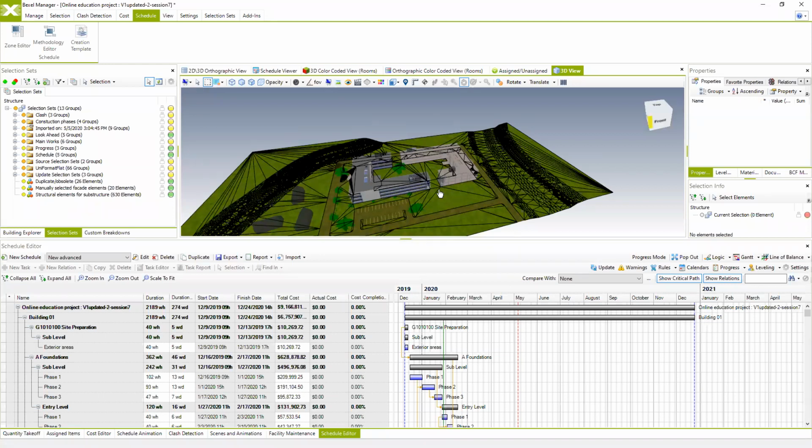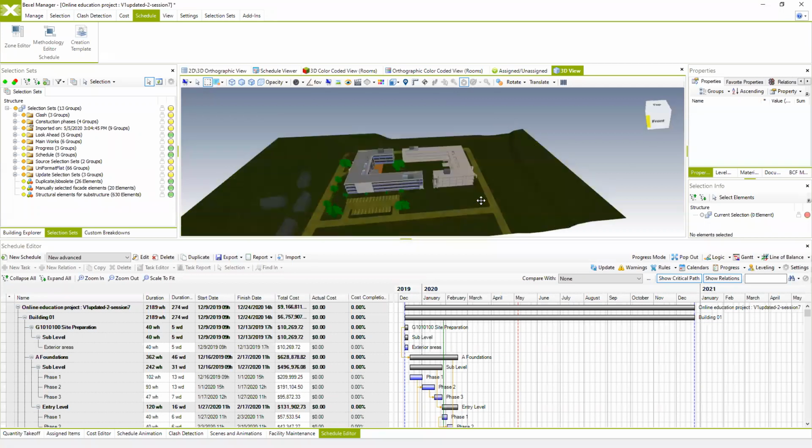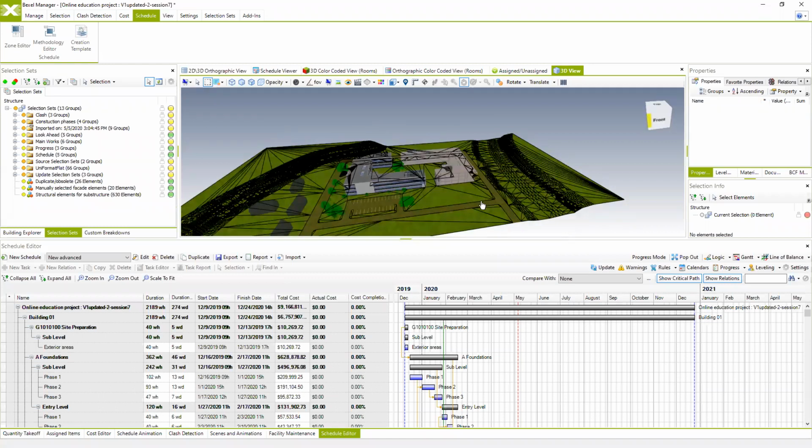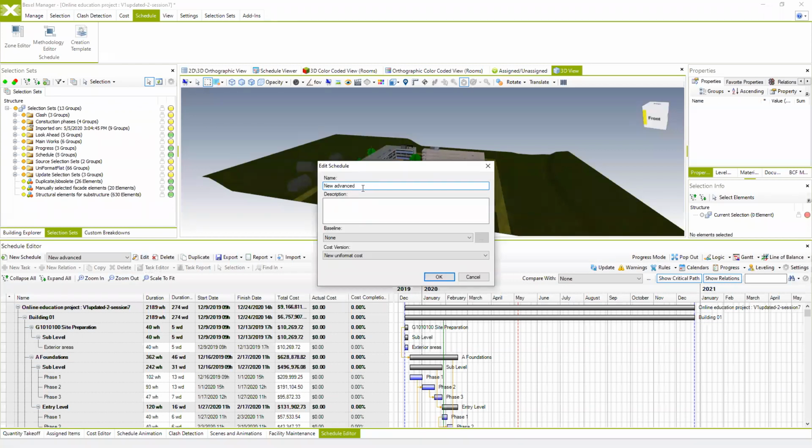input the progress for each month. I'm just going to do it for 1 month, and you can get a clear picture of how and what is the best way to do it yourself. So if we have our schedule, this is the one we created yesterday, the common workflow is that this planned schedule actually becomes our baseline schedule. And we can rename this one and call it baseline.